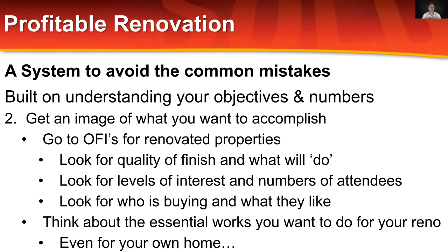What you need to do is provide something that is better than what other people are doing, but you're doing it on a budget. And that way you can see approximately what you need to spend. More importantly, you know what it sells for, and therefore you know the cap of value that you need to be able to sell it for, and therefore how much money you might be able to make depending upon how much you spend. So look for quality of finish and what will do in a renovation.